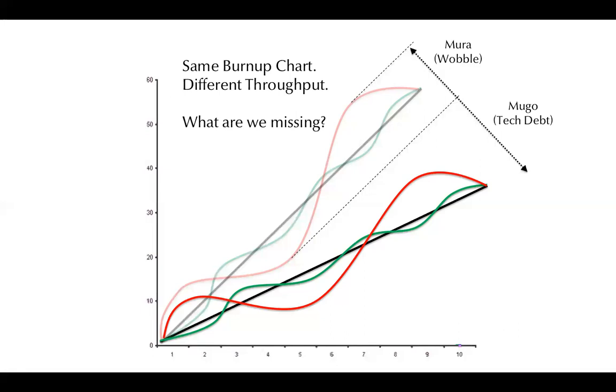Oh, you used the word. And, no, there are so many tips and tricks you can apply to this. I mean, overestimate, estimation inflation over time, or you chop stories into even smaller parts than originally intended to increase the throughput and all these things.